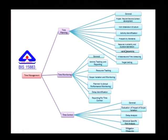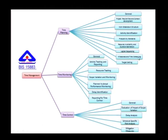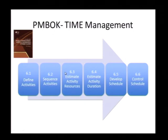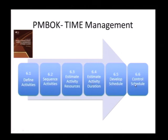We will spend a little time on logical sequencing at the end of today's lecture, and then look at milestones and time scheduling. That is how the BIS standard looks at it. Looking at the PMI PMBOK standard, the elements of time management are: defining activities, sequencing activities, estimating activity resources, estimating activity duration, developing the schedule, and controlling the schedule.